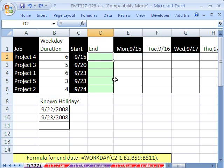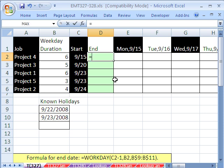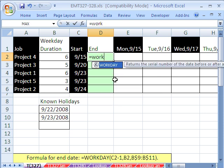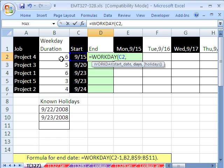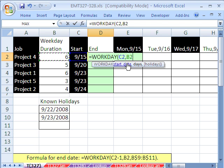Our formula for end date is workday, and it needs a start date. So I click right there, comma, the total days for the project, or the total days going forward. Right now, it'll do Saturday and Sunday. So it'll add extra days, an extra day for Saturday, an extra day for Sunday, comma.